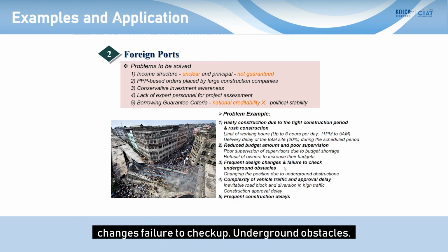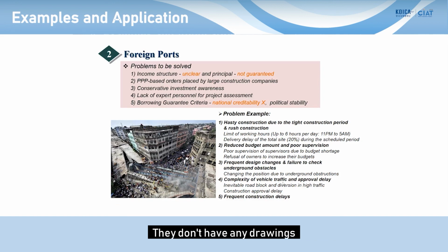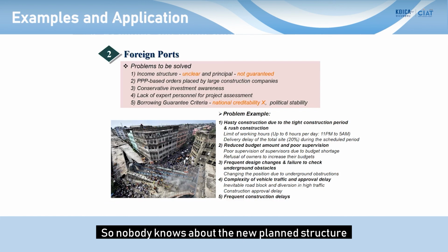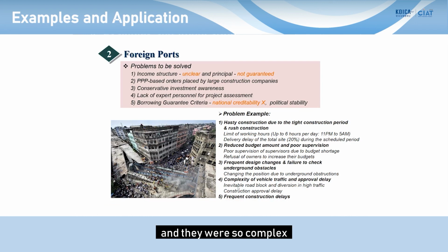Frequent design changes, failure to check underground obstacles. Most structures need a foundation, but you don't know what kind of structures are passing through under the ground. They don't have any drawings. And also, nobody knows about the new plan over that underground structure. And also complex vehicle traffic.